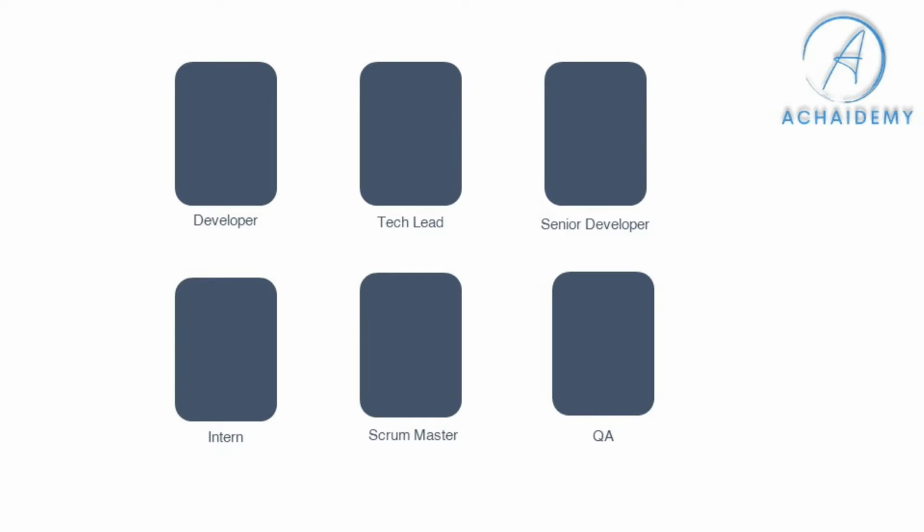Now, efforts are not initially visible. When you're face to face, we use cards. Everybody will have cards from the Fibonacci series, ranging from 2, 3, 5, 8, 13, 21, and everybody shows the cards together once they say their efforts are done. Then everybody looks at the numbers and brainstorms to get consensus on the number.